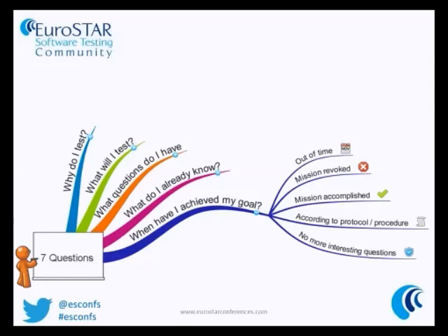And we had a lot of defects. They were solved, they were retested, and eventually we came to a state where in the defect meeting the project manager noted, okay, we have no more critical defects. We have like 2 defects that have a medium category and the rest is low. By my standard, we're done. That didn't mean that I felt comfortable that we were going live. That just meant that he had an agreement with the stakeholders that once a certain amount of test cases were executed and no more critical defects were there and less than 5 medium level defects were there, that there was no problem anymore.